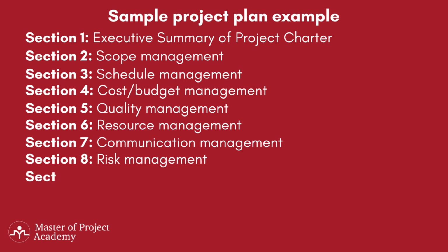Sample project plan example, section 9. Issue management. This section contains all issues surfaced or detected in any project element. It mainly contains the issue log. The issue log is normally maintained by project managers in a separate document away from the project management plan. The project team may also merge the risk log with the issue log in addition to other logs like assumptions and constraints log into a single document.